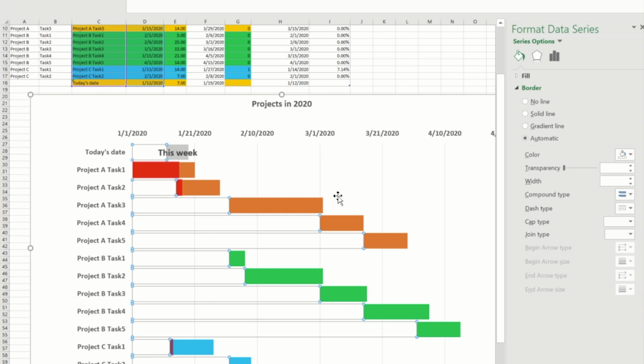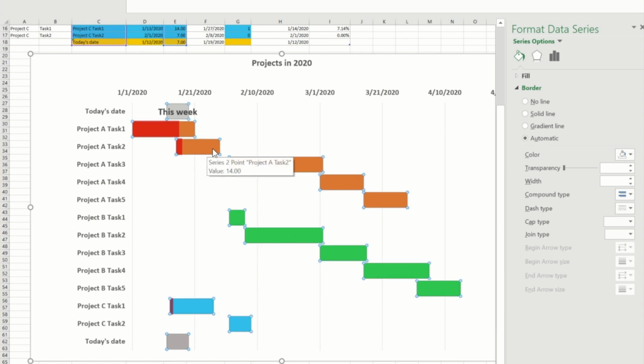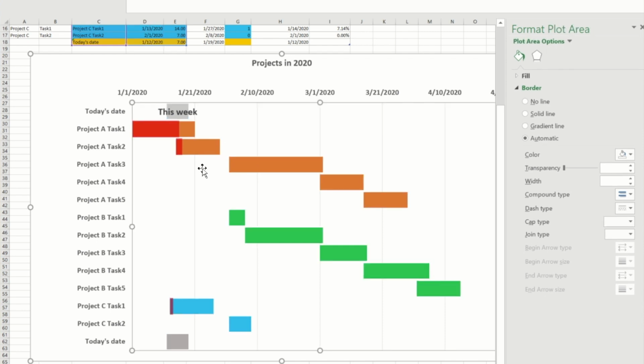It's a sophisticated way, and I sound so nerdy when I listen to myself talking, but I'm so excited to discover how to make a Gantt chart. You have to reverse the y-axis to make the date show up on the top, and that looks exactly like what someone would pay money for to get the project management tool in the software.